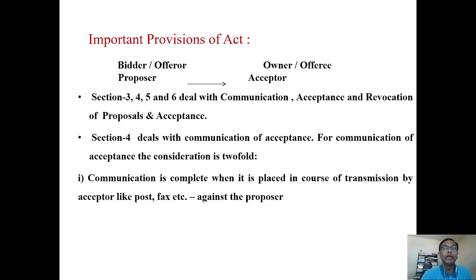Means when acceptance of the offer is received by the bidder, then there is a binding contract existing between the owner and contractor. A binding contract is formed as per this when the acceptance from the owner is reached and received by the bidder, right?